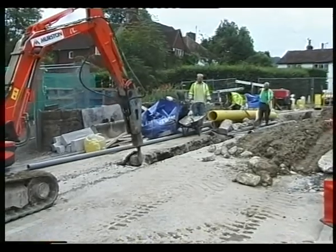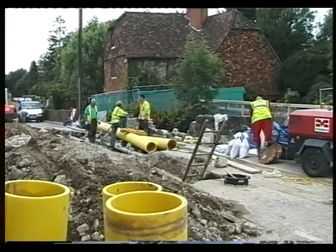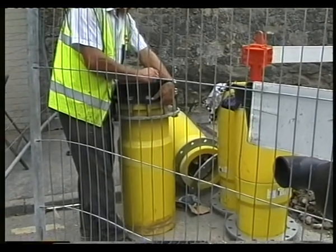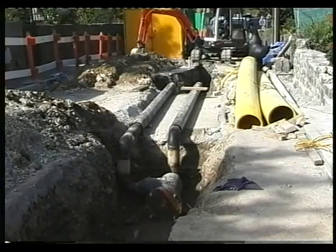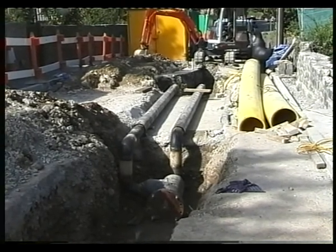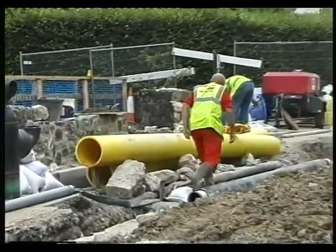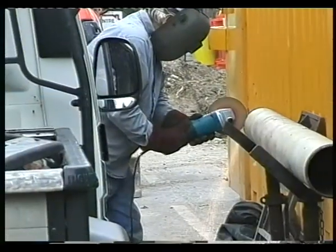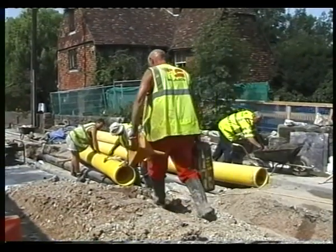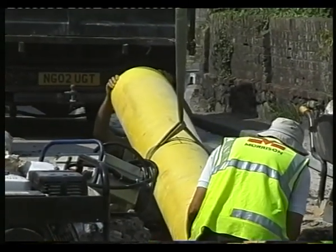Whereas previously there were 4 small gas mains on the bridge, other pipe runs and supplies from different areas since the originals were laid meant that only 2 were required. When the services cross the deck, they use steel pipes for strength, as they'll be quite near to the road surface. Reconnecting the gas took 2 whole days. It was a very complicated procedure.